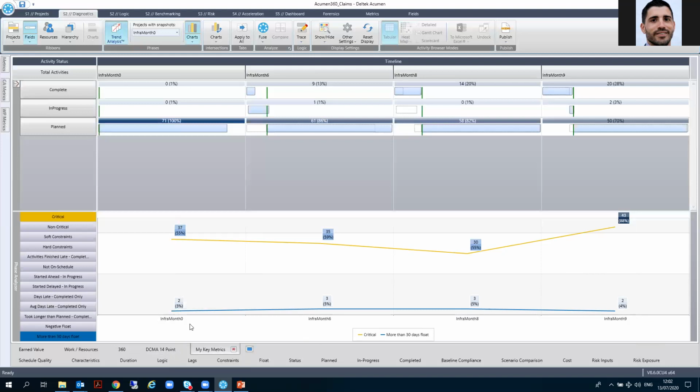So if I see this number of activities with higher float, that can be more than 45 days in your case, or more than 15 days in your case, starting from 15 activities or 20 activities, and in my first 3 months this number from 30 has gone down to 15 on a 5-year program, how can somebody justify that 50% of my activities in the first 3 months have been reduced by 50%?